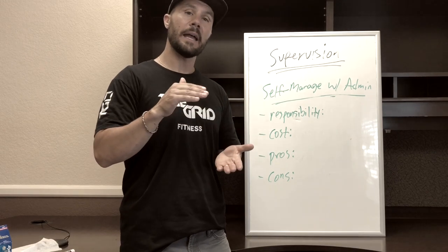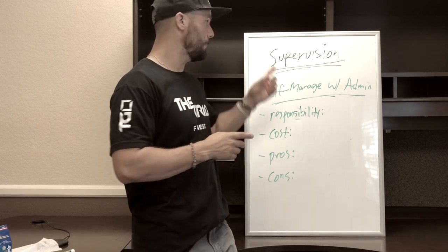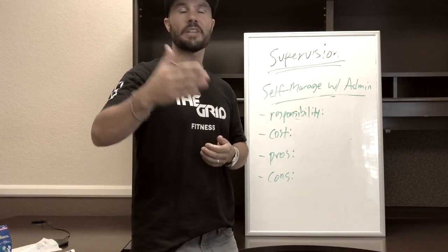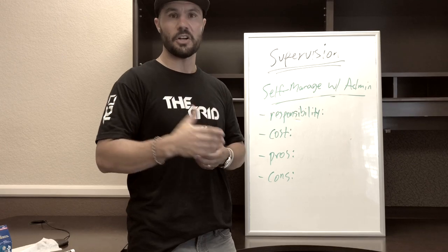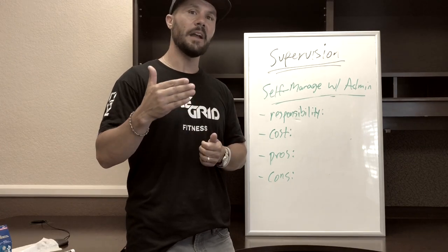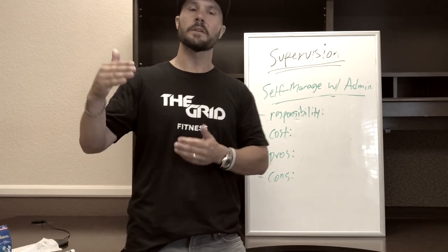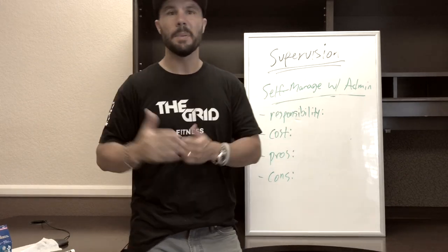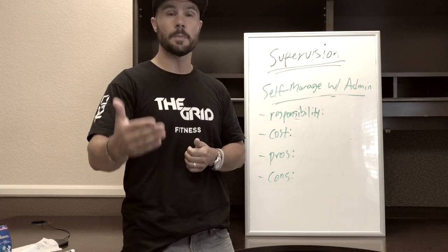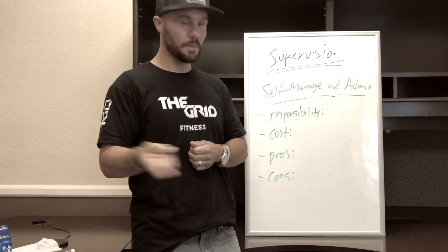So if I were to hire a builder GC for one of my multi-million-dollar spec homes, new construction, a $4.5 million home, it would cost me $150,000 to $200,000 to hire a builder. It would cost me $80,000 to $100,000 to hire a supervisor, one project to supervise it.